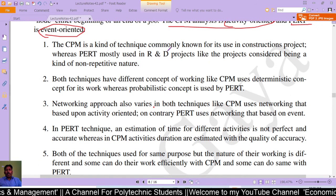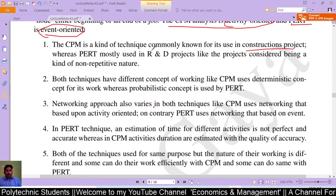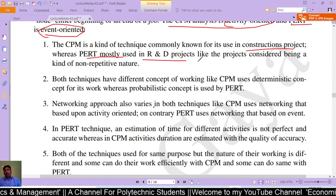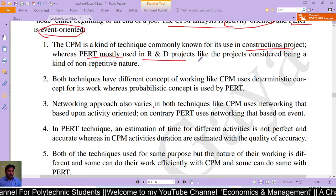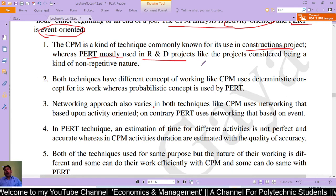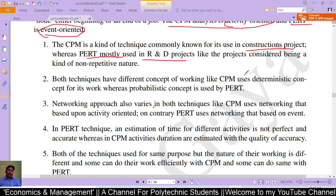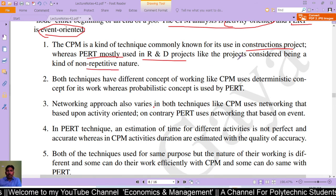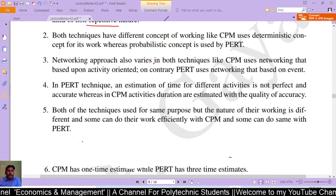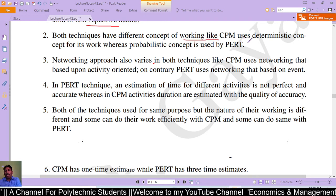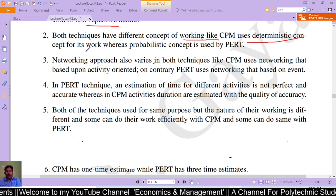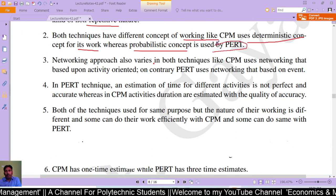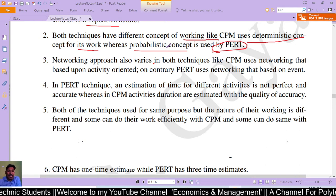CPM is a technique commonly known for its use in construction projects, whereas PERT is mostly used in research and development projects of a non-repetitive nature — projects where it is difficult to determine when completion will occur. CPM uses a deterministic concept for its work, whereas PERT uses a probabilistic concept.